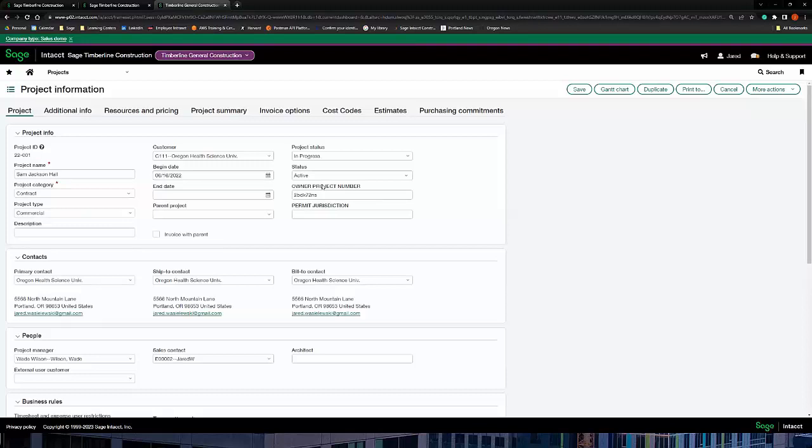Where this could also come into play, again, elaborating on smart rules and smart events, is that smart rules act as kind of a guideline. So when we're creating a new project, we can help require or add specific workflows or fields to be captured within here. So in this case, if I always want an owner project number every time I'm going in here and setting this up, I can make this field required. So if a user tried to hit save without submitting those fields, the system's going to give you a notification that you're missing that information, right?